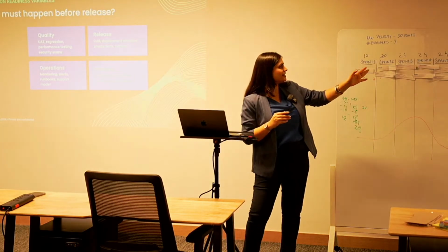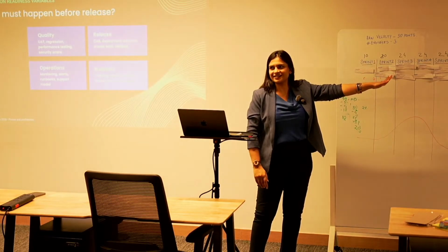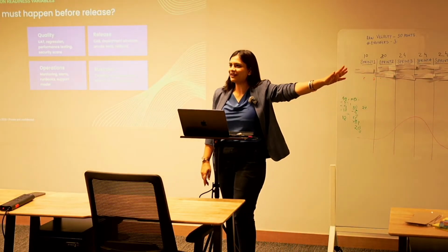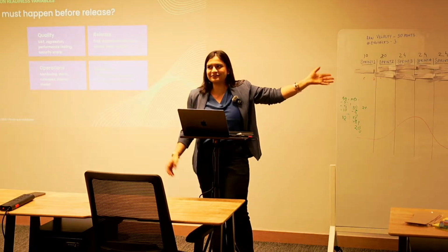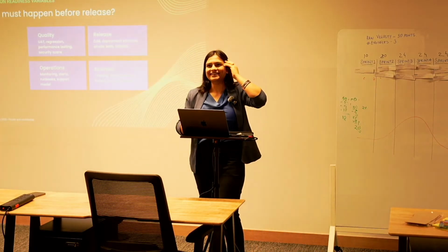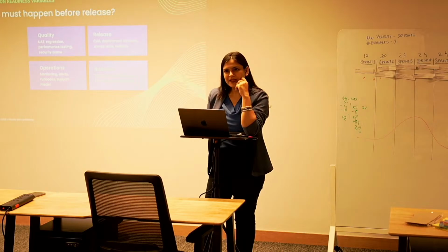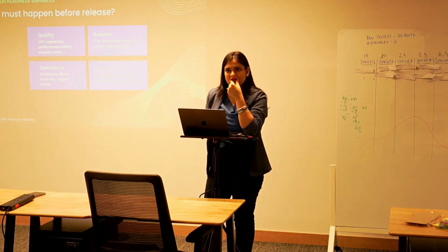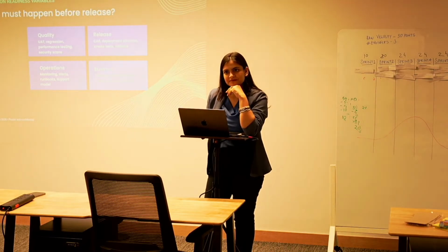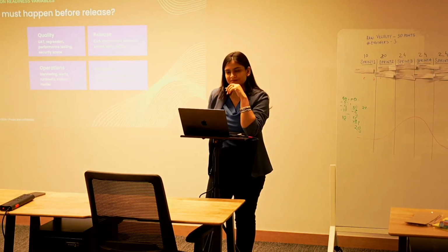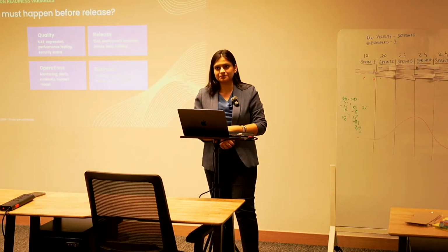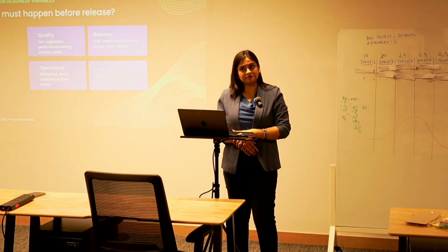So let's even assume there are 2 sprints after this. It's taking your plan to 8 sprints now, and initially we had thought 3.5 sprints. Wow, we are done. We are not saying the release or the deployment to production only happens at the end of sprint 6 or something. Because ideally, it would happen in slices. It would happen in slices, and probably after sprint 2, if a sizable chunk is ready, the deployment should happen at that point itself. Correct. So you have much more time to be ready in production than going after the whole sprints.